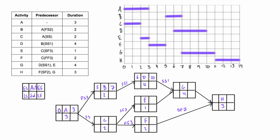C is a start-start relationship coming off of A, so it can start when A starts. We have zero, then zero plus two gives an earliest finish of two. For E, it's a start-to-finish relationship with a lag of three, so E's finish will be three days after C's start. Zero plus three gives us three in the early finish, and then to find the early start we subtract the duration, so E would start on day two.